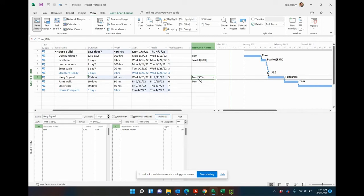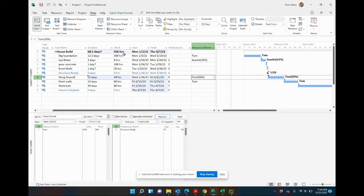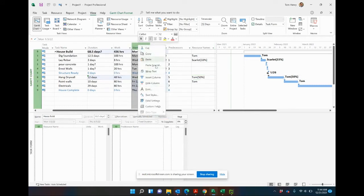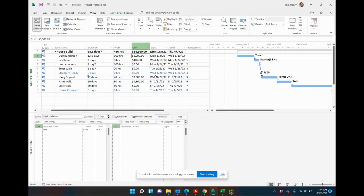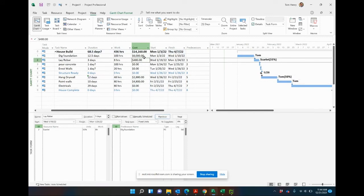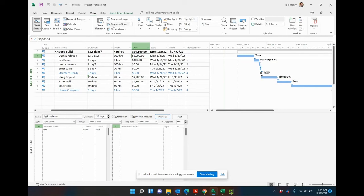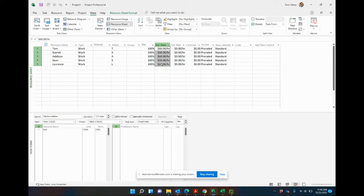So there we go, estimating duration and work can really help you when you're calculating out the most important thing in your project, which is going to be the costs. So as we come in and get very granular with this, the costs are going to be calculated for us based on the resources' hourly rate. Very important when estimating the duration, estimate the work so that when you assign a resource we're getting an accurate picture of how many hours that particular resource is going to work on that task.